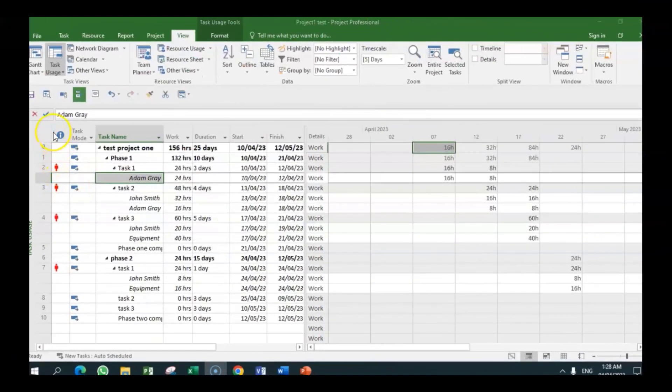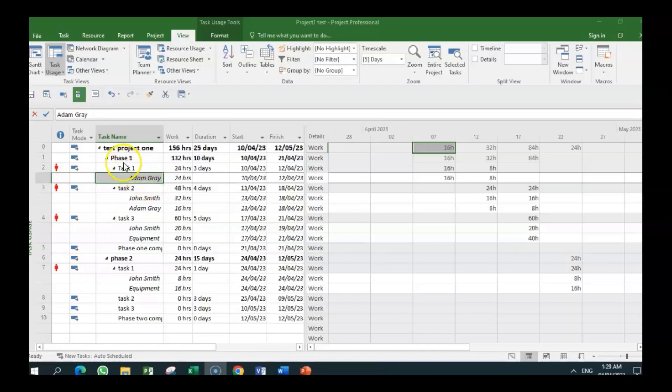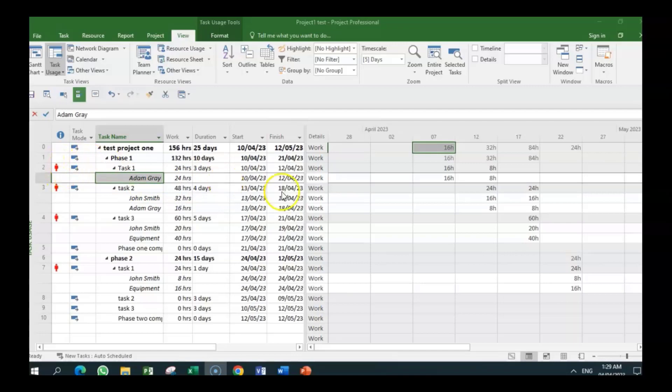So we have gone into the task usage view. So we are still investigating Adam Gray to find out. And we see him with task one. And this view gives us the task and the resource and he's 24 hours, and it is also showing over-allocation. So when we go across, we realize that he is working 16 hours.